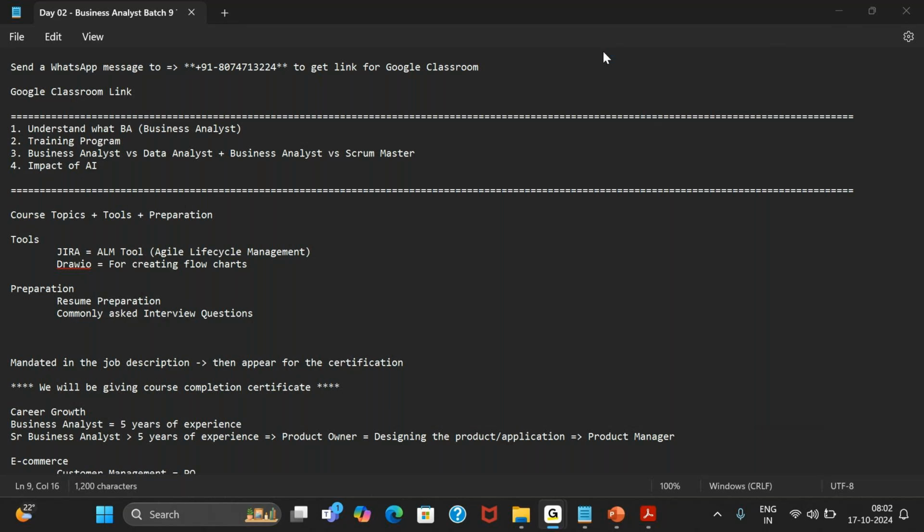challenges. Use that rapport and inform your stakeholders in advance, but don't just inform about the negative news that we may not be able to meet the timelines. You supply it with the action that you are going to take. If I say I cannot meet the timeline, that is not enough. What am I doing to actually meet the timeline? And if I'm not going to meet the timeline, what's my revised plan? So that my stakeholder gets an impression that I'm not simply sitting idle. I'm taking some action.